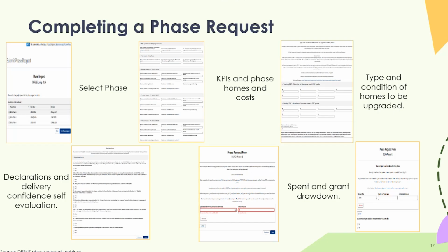That's fine. You'll be asked in terms of the cost associated with the phase. So that'll be any capital grant drawdown, A&A grant drawdown, co-funding, and then it will add up the total grant costs. Please only include costs associated with the phase. We have seen a number come through where they've done years 1, 2, 3. I know it's not necessarily very clear in the question. The guidance does say that it should just be for the phase, but please only include costs associated with the phase. Again, go back to thinking about the principle of what a phase is.